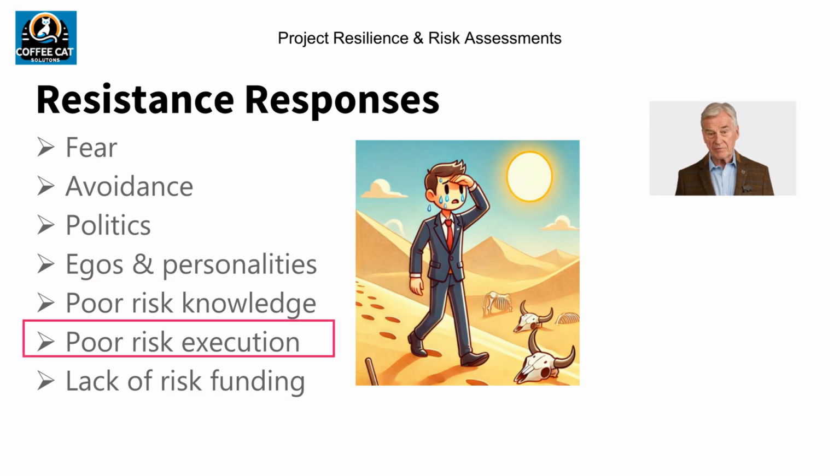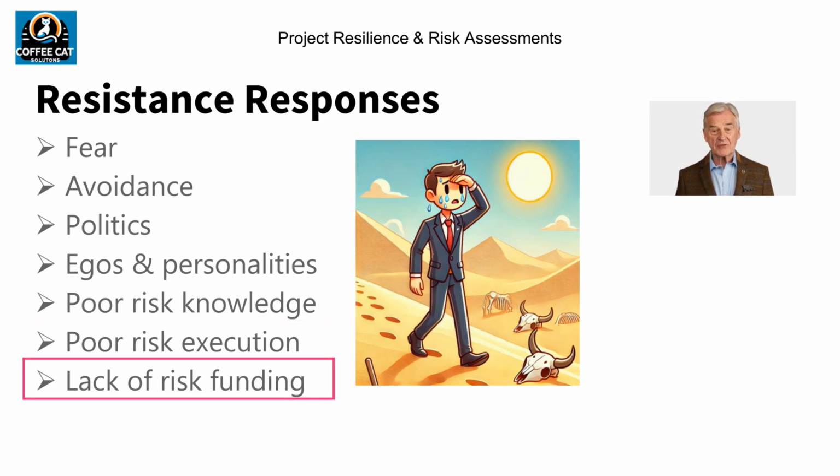Poor risk management practices are also easy to spot and should be mitigated through training and adoption of a risk management framework. Working with the PMO or audit team can help facilitate the adoption and implementation process. Lack of financial support for the funding and use of risk management and assessments usually results when management doesn't see the value. Risk management education that uses quantitative cost-benefit and ROI analyses can create convincing arguments that result in allocation of funds for risk management.